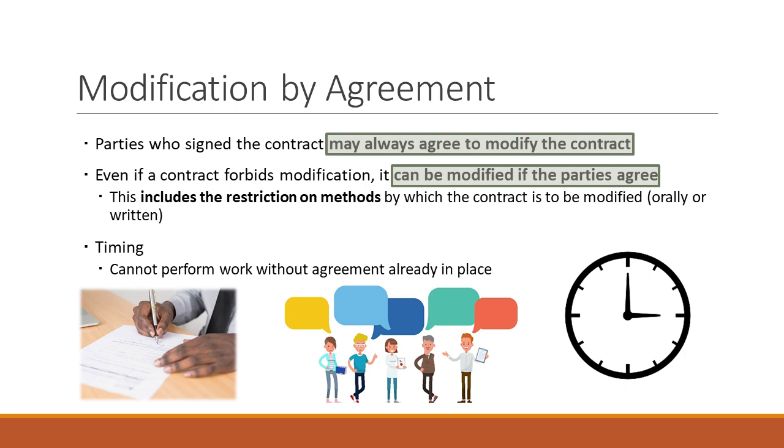Let's look at just regular construction where the contractor's looking at that wall detail and they send out this RFI. And it turns out that the contractor, as they understood the agreement and the drawings, bid a certain price based on the way this wall was designed. And if it turns out that the wall can't be built that way or needs to be changed, you still have to modify the contract. And so, as a result, you need to have this process, called change orders, and we'll get into them a little bit more.